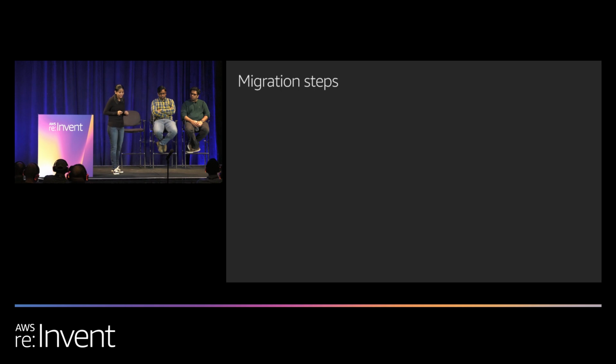But again, as a best practice, you should try to reach this state at least a day before your scheduled cutover time. The reason is, it gives you enough time to plan for any mitigation for any unexpected problem which can happen during this entire migration process. So we too planned the same way, and we reached this state 1 day before the scheduled cutover time.